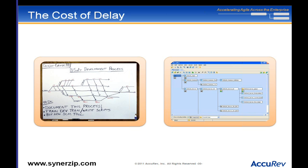It turned out that the particular feature which motivated most people to buy the product was done in the first month of that year-long project. If we had been using agile back then, we could have delivered that within a month. In retrospect, the cost of delay was 11 months of those new increased revenues. That's a pretty painful thing.